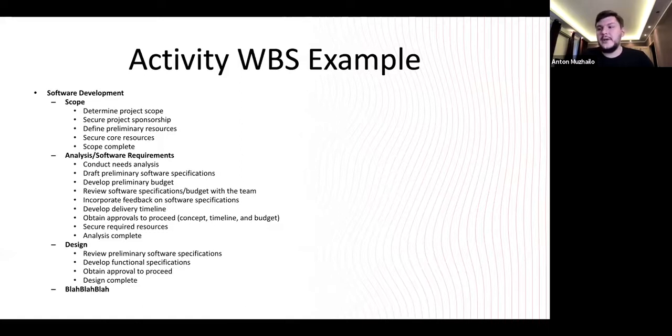So if we go with a classic approach, like waterfall or V model, no problem. We can have these WBS estimations for the entire development project and testing. But for Agile, we can do the same for the release, because it's also a little development project. Okay, so this is how it may look. And you can put this picture on a timeline using different tools for creating Gantt diagrams. You just put items there, put them in proper order, put some dependencies between them, etc. So that's also an easy way to do this job.